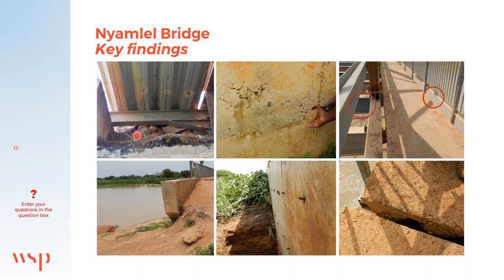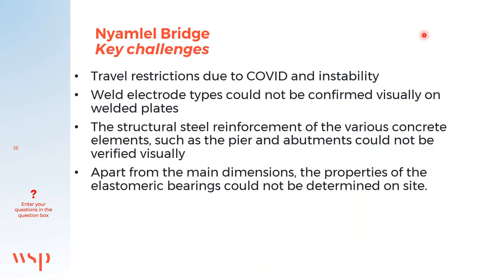Key challenges experienced in this project: first, travel restrictions due to COVID caused delays as most countries had their borders closed and no flights were allowed, requiring constant communication with the client. Additionally, weld electrode types could not be confirmed visually on the weld plates, structural reinforcement of concrete elements could not be confirmed visually, and apart from the main dimensions of the bearing seats, their main properties could not be determined visually on site.